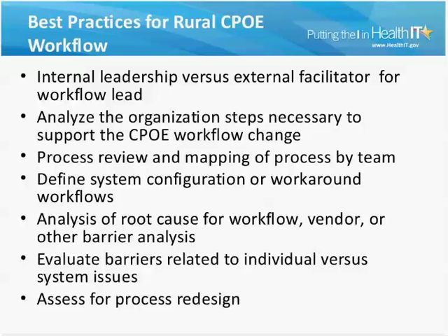As far as workflow, workflow, of course, ties hand in hand with training, simply because every time when you have workflow, you must train on it. So let's take a look at what we can see here. Internal leadership versus external facilitator for workflow lead. So internal leadership is going to say, here is our workflow as it existed before CPOE came in place. The external facilitator, oftentimes a consulting firm, or even more often the vendor, will show kind of the recommended workflow within the system.